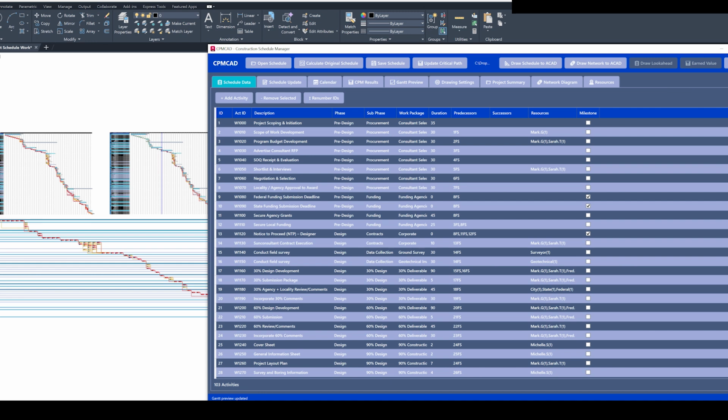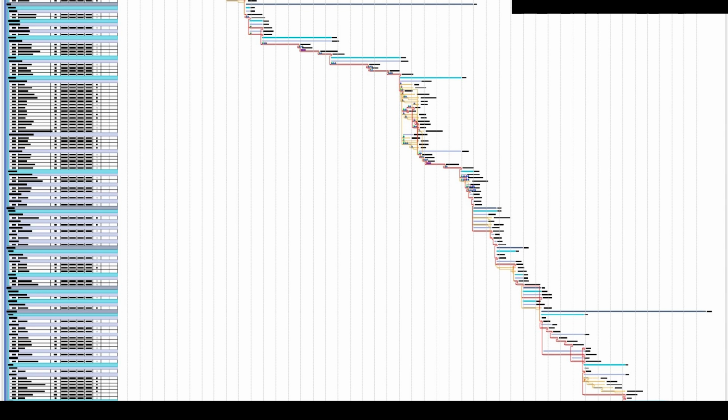And finally, keep in mind that as your project progresses, your Excel workbook will grow. Your first worksheet is always resources, and that name must stay as is. Your second worksheet is your initial schedule, your baseline. From there, each schedule update gets its own worksheet. So if you have 12 updates over the life of your project, you'll have 14 worksheets in that workbook. Resources, initial schedule, and updates 1 through 12.